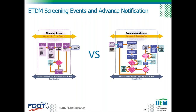During the programming screen, qualifying projects are reviewed when being considered for funding in FDOT's five-year work program or MPO transportation improvement program, or if already funded before advancing to the PD&E phase. During the programming screen, qualifying projects undergo ETAP review and coordination, and advanced notification may be initiated. At the conclusion of the programming screen, the project scope is developed and the final programming screen summary report is published. ETAP coordination is ongoing throughout planning and programming events and both the ETDM manual and PD&E manual are followed.